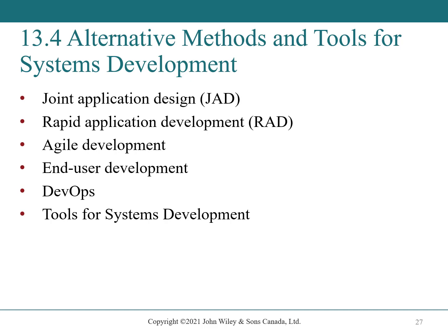In the first rapid application development stage, developers use joint application design sessions to collect system requirements. This strategy ensures that users are intensively involved early on. The development process in RAD is iterative, that is, requirements, designs, and the system itself are developed and then undergo a series or sequence of improvements. Rapid application development uses ICASE tools to quickly structure requirements and develop prototypes. Users then review them in additional joint application design sessions.